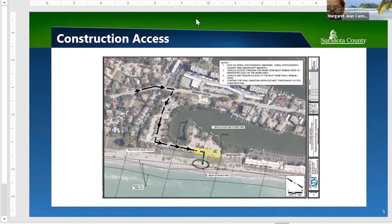Question: Have you looked at using a barge to bring the sand out instead of trucking it? We have not looked at that — FEMA has tied its grant specifically to a truck haul project. That is the project they will pay three-quarters of, and there isn't time to go back and argue an alternate method with them.